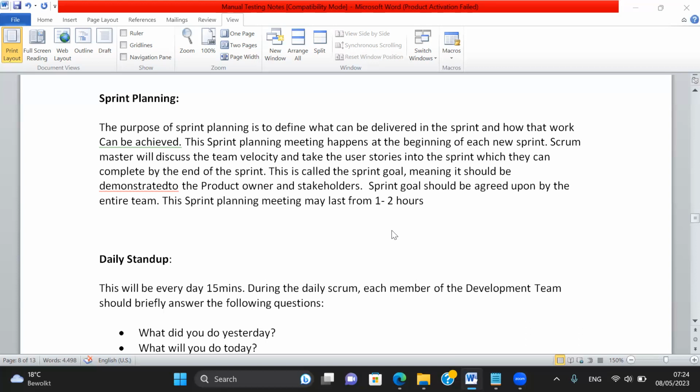See, either they can go to the meeting room, or they all can go to the Scrum Master's place, or they can just stand up in their place because all the team sits together, right? So at that specific time, everyone will stand up at that place and each and every person will tell what they have done yesterday. One developer will tell, okay, I am working on user story 1, and I will continue working on the same today also. I'm not blocked on anything, my work is going. The next person will tell, okay, I'm working on user story 2. I have finished user story 2 development and I have sent my code for review.